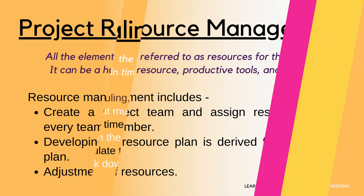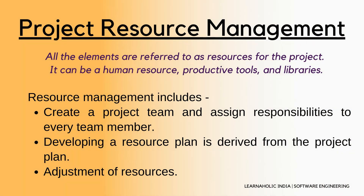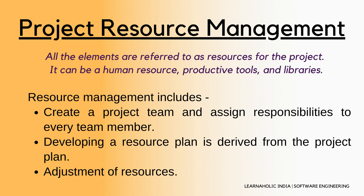After that, project resource management comes into the picture. In software development, all the elements are referred to as resources for the project — it can be human resources, productive tools, and libraries. Resource management includes creating a project team and assigning responsibility to every team member, developing a resource plan which is derived from the project plan, and then adjustment of the resources.